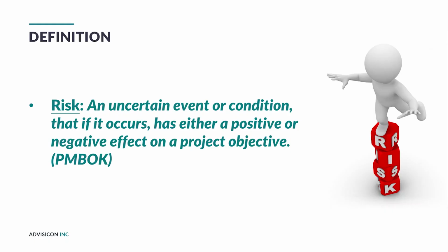Other things I just want to say here quickly: when you go through and look at this, the composition of a risk itself is basically composed of the risk, the impact, and likelihood. So we can have the impact should the risk occur and the likelihood of it occurring. You can actually build a formula where risk rating equals impact times likelihood. That's something useful that you see. That's basically the composition of what the risk is.